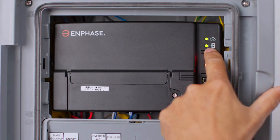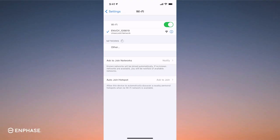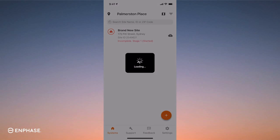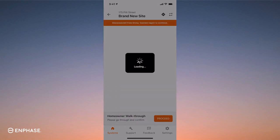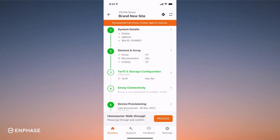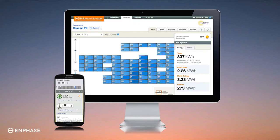Let's disconnect from Envoy AP mode by turning off Wi-Fi. The system is now synchronizing. As we haven't built the arrays in commissioning Step 2, the system is at Stage 3, so this task still needs completing in Enlighten Manager. Your customer will automatically be emailed by Enlighten to open up their monitoring — this will happen 24 hours after you've completed all commissioning stages successfully. You can continue to monitor the system performance on Enlighten Manager. And that is your pro commissioning completed. Thank you for watching and all the best with your next installation.